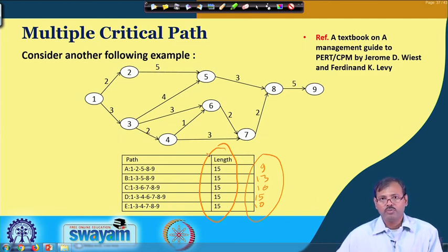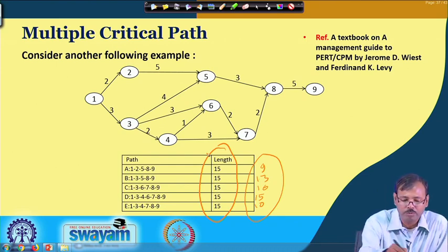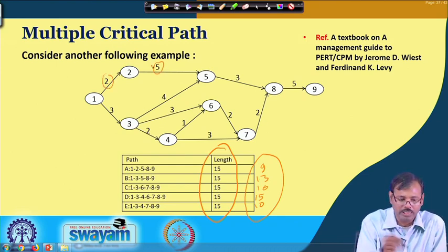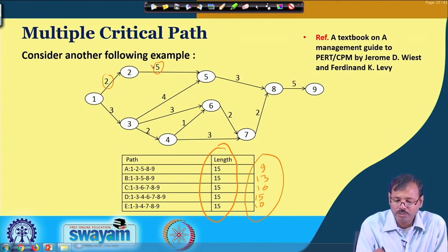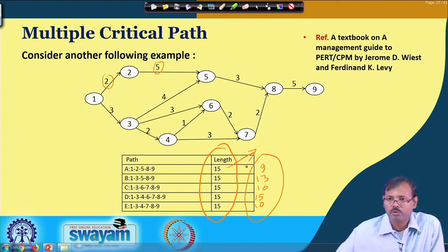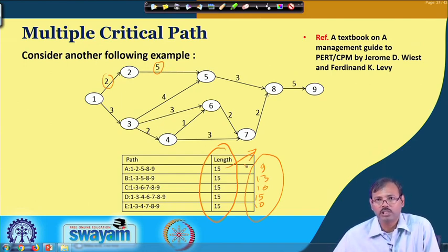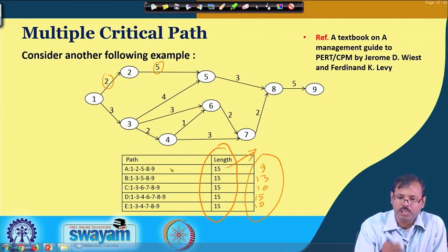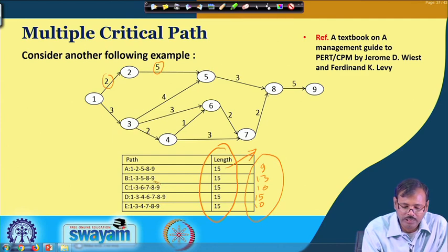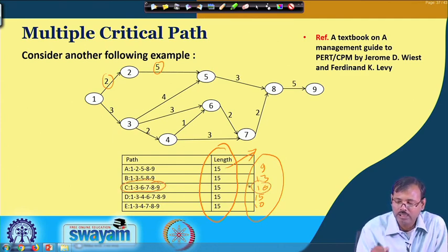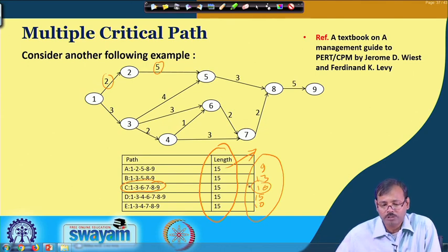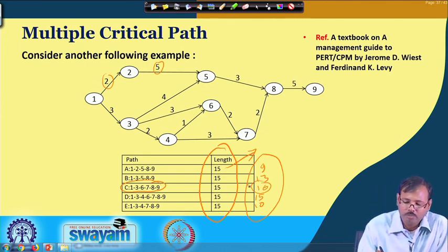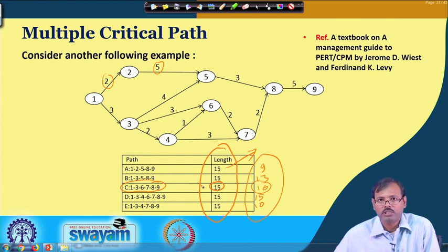By changing that, suppose they reduce the manpower in some job at this position or that position earlier in the network, and by doing that they lengthen this path to 15 hours and reduce the cost of production for this path. They invest additionally in the critical path, that means C, which was taking 16, but the additional investment in terms of man, machine, material etc., allows them to shorten the path to 15 hours, and that allows them to address the target time of 15 hours for the completion of the complete network.